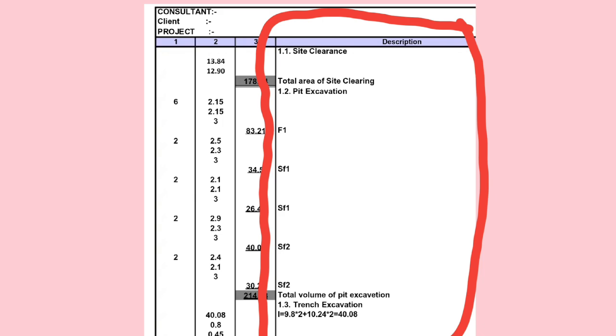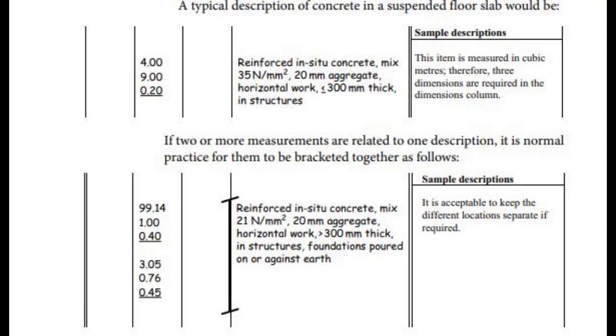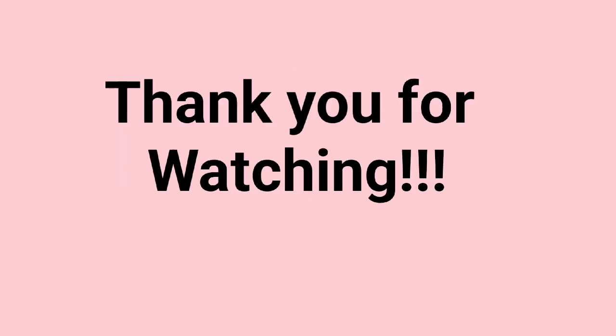The description column explains what the quantity represents. It records nature of work, material type, location within the building, special instructions or specifications, notes on deductions or additions. This column ensures that numbers are meaningful and interpretable. It may also contain notes relating to waste, lapse, joints, or assumptions, which is why it is often called the waste column. Rates and prices must never be written here.